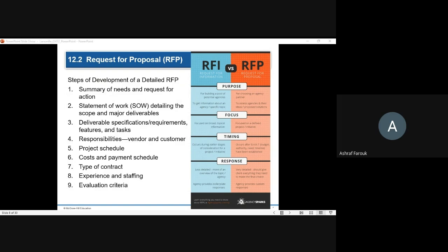Request for information, mainly it will be for some extra information or more information regarding the fixing, the details, how we are going to fix this item in conjunction and in relation to the other items. So that's going deeply into technical details about the product, either the illustration or the specs.